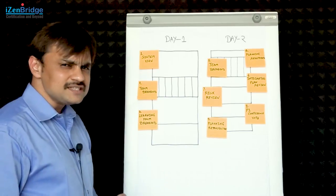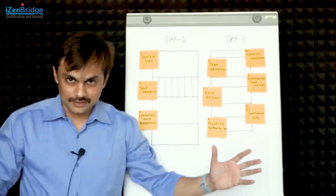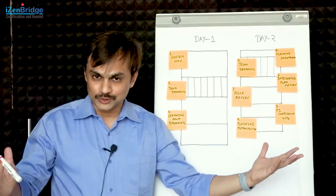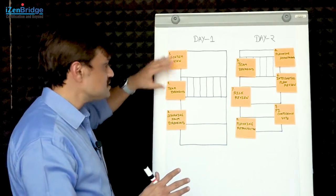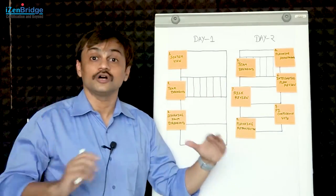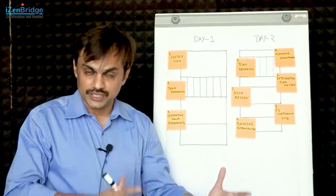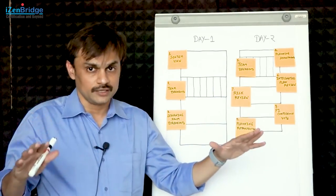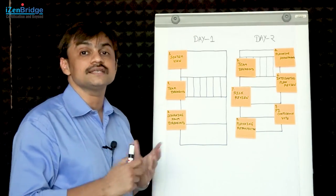This day 1 and day 2 gives us a good insight - again it is just a default starting point. With 100 people sitting here, face to face or on a Zoom call or in some virtual tool, they want to know how to proceed in the upcoming PI. The first thing we need to do on day 1 is give them a big system view, so everybody has a common understanding about the opportunity ahead, the milestones coming, the technological approaches we are going to take, and where we stand at a given point in time. That is why the initial section of day 1 focuses on setting up the system view.